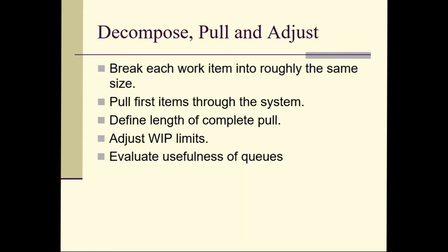So your speed of production is determined from the needs of the person downstream of you. The person who's consuming your deliverables will set the pace at which you need to create them. Adjust your work in progress limits to match, so that we can be a little bit more proactive and just keep in touch with our work in progress limits and keep an eye on our completion queue. If it gets too thick, too deep, we can slow down a little bit.